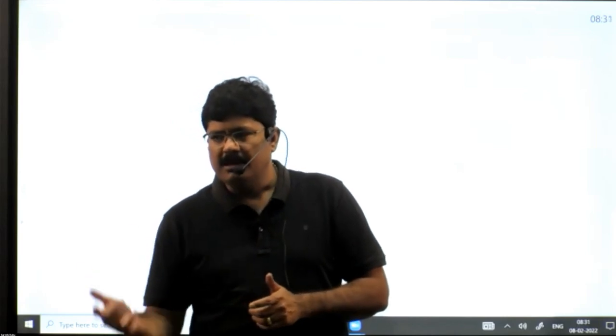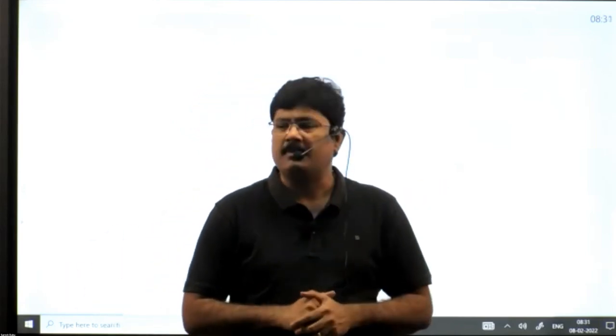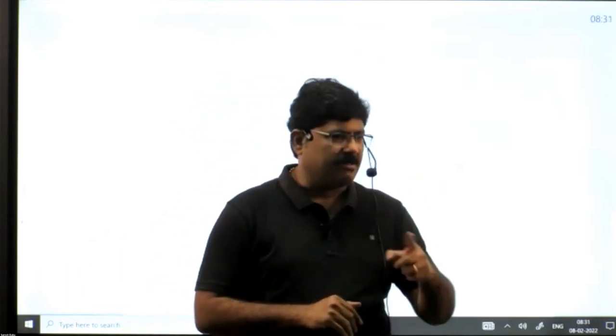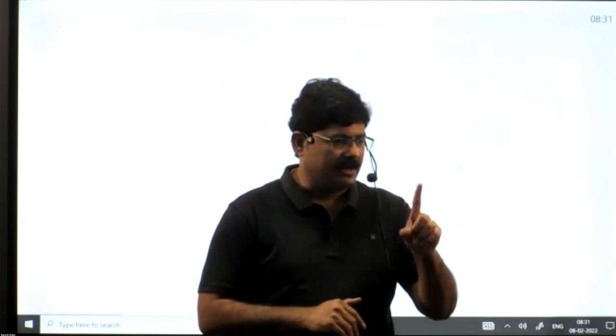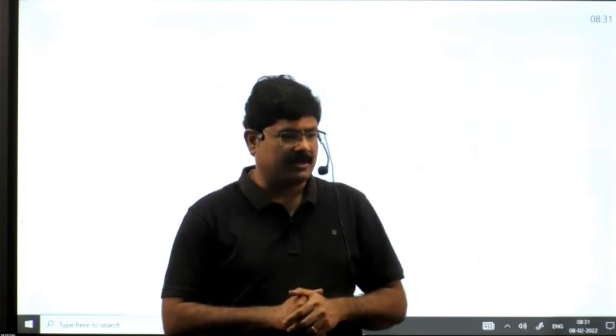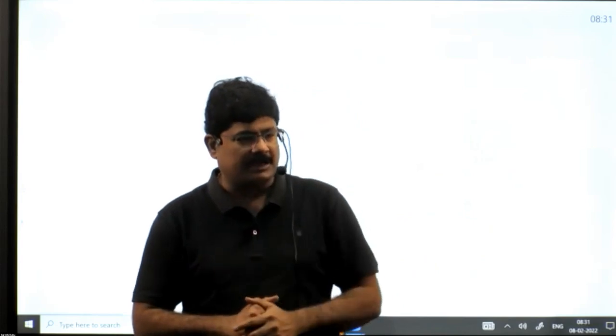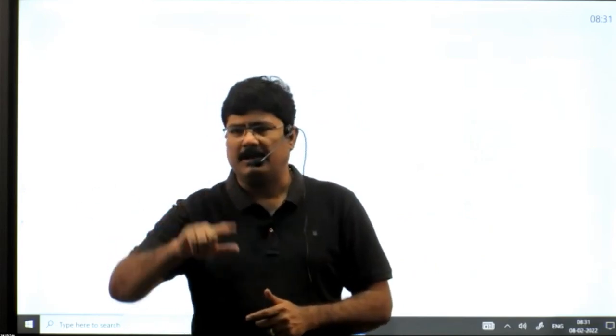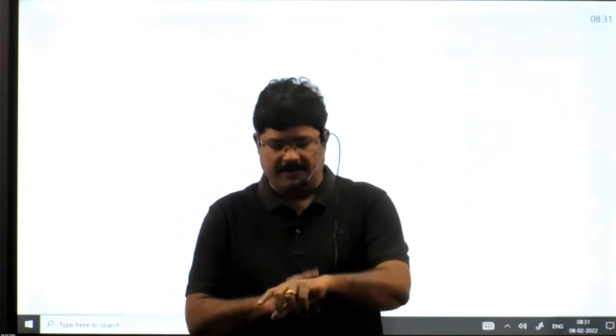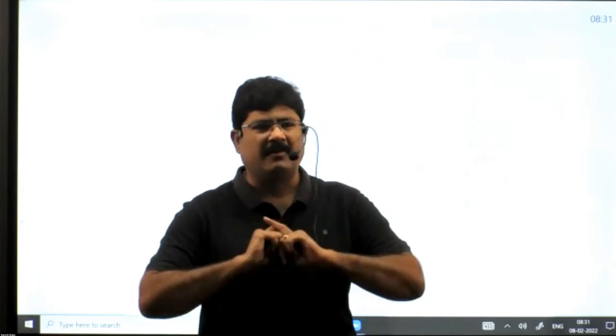By end of the day, you have to submit all the defects to the team members. The next day, soon after you receive the defects, 1 day, you need to resolve all the bugs. Next day, you have to give the next release. You have to do retesting and regression testing. Finally, by the Friday evening, we'll have the final meeting.